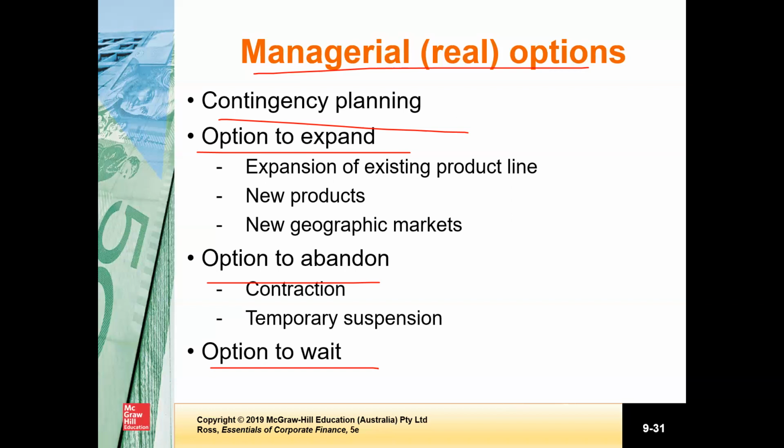At the other extreme, the option to scale back or even abandon a project is also quite valuable. For example, if a project does not even cover its own expenses, we might be better off if we just abandoned it. Our DCF, discounted cash flow analysis, implicitly assumes that we would keep operating even in this case. In reality, if sales demand were significantly below expectations, we might be able to sell off some capacity or put it to another use. And maybe the product or service could be redesigned or otherwise improved.